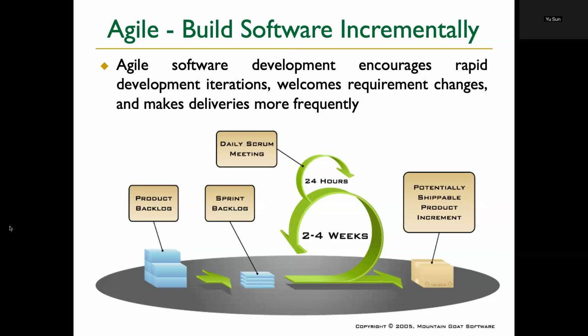A lot of new teams do a 1 week cycle because in the beginning, a lot of things go faster. They want to build things faster. Most of the big teams do 2 or 3 weeks. The bigger the team is, the longer the cycle probably would be, because it takes longer to build new things.